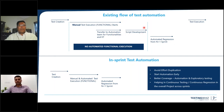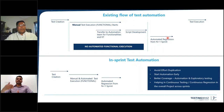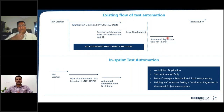After the script is developed, it goes into N+1 sprint. This means that when automation scripts have been developed and made deployable, they are far more behind than where the project is actually progressing — or where the manual testers are creating test cases for. So there's a backlog of test cases created, a backlog of manual test cases ready for automation. There is a lagging mechanism here.